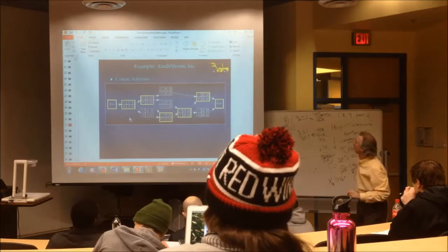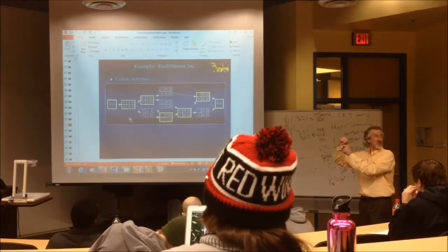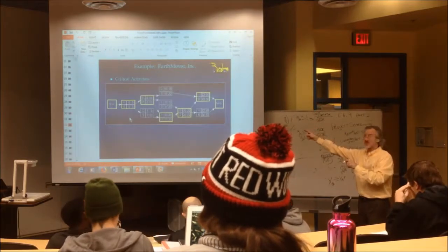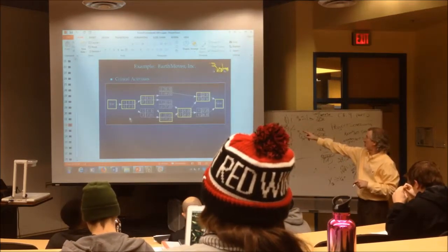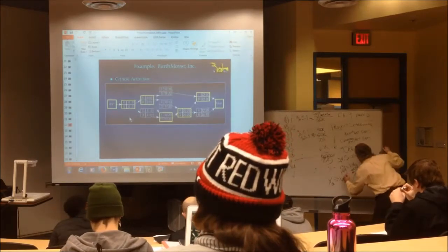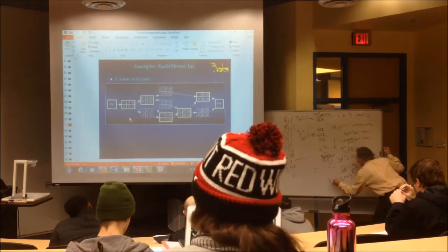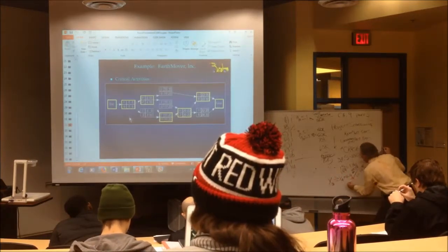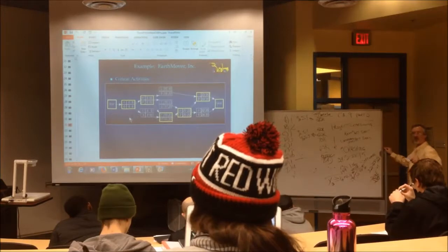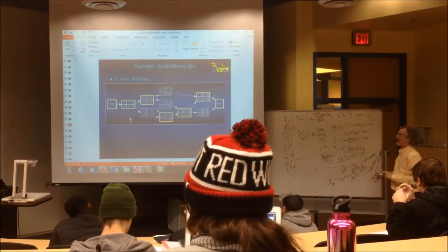Look at the normal time for B: 4. The regular times are underneath the letter when you're doing the forward and normal test. The 6 would be the earliest start and the earliest finish, but the 4 is the normal time. So put a 4 here, minus the y variable for the activity we're writing this for, B. So I just wrote the activity constraint for B by following those steps.